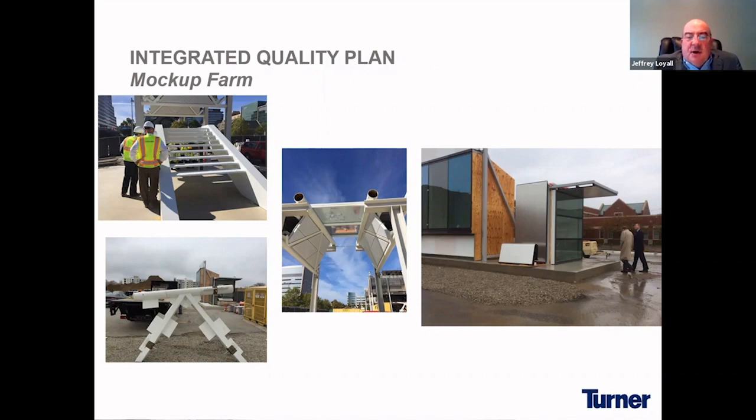So we had the CEO of the Cleveland Clinic and the president of Case Western on the mock-up one day. And we asked them, would you like to save $600,000? If so, keep the welds where they are. And they all agreed, yes, that's what we want to do. So in the lower left-hand corner, we mocked up every field weld that would happen on those exterior trusses, just so there was an expectation as to what was expected.